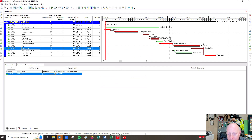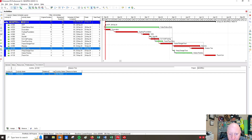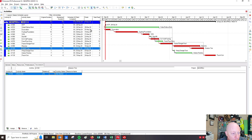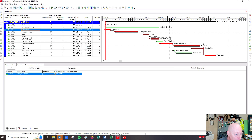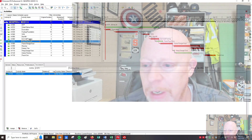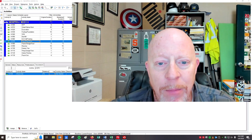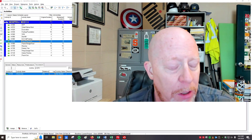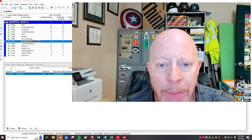That is something crucial, especially going forward. When you have bigger jobs and bigger projects with multiple start-to-start relationships, you want to make sure those are done right — you can see how that changed my days. Number one was the milestone. Number two, look for missed relationships, because your hand schedule is probably right if your math is right. Keep your hand schedule with you, follow it, and click on the different activities to check predecessors and successors, making sure everything checks out.